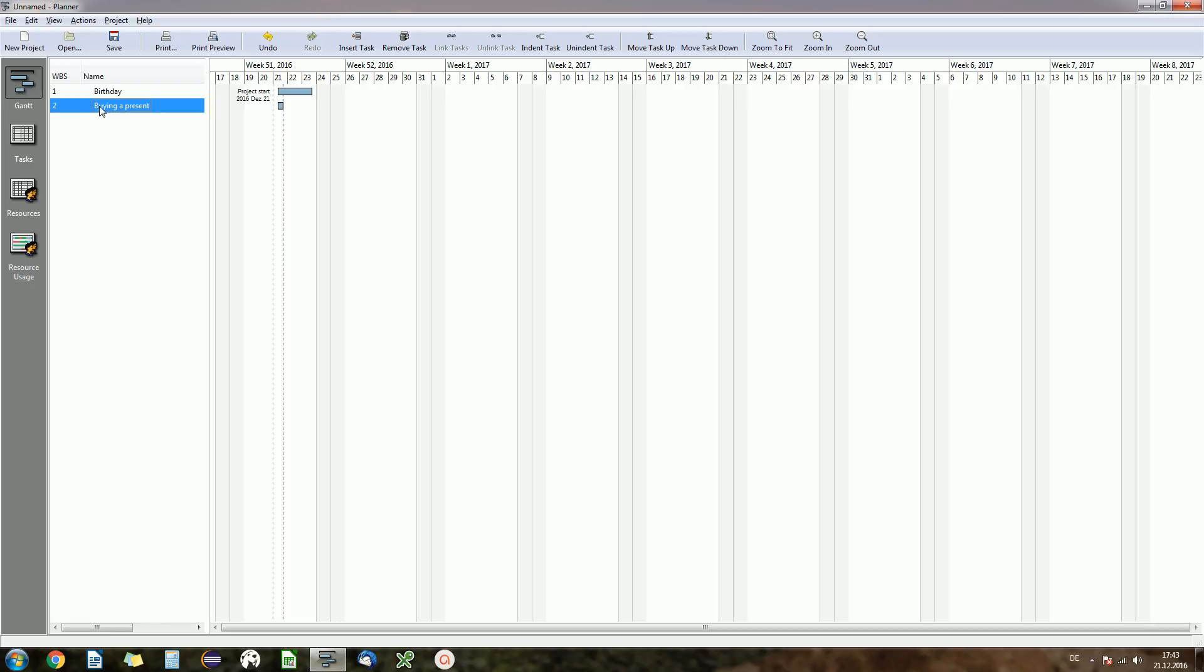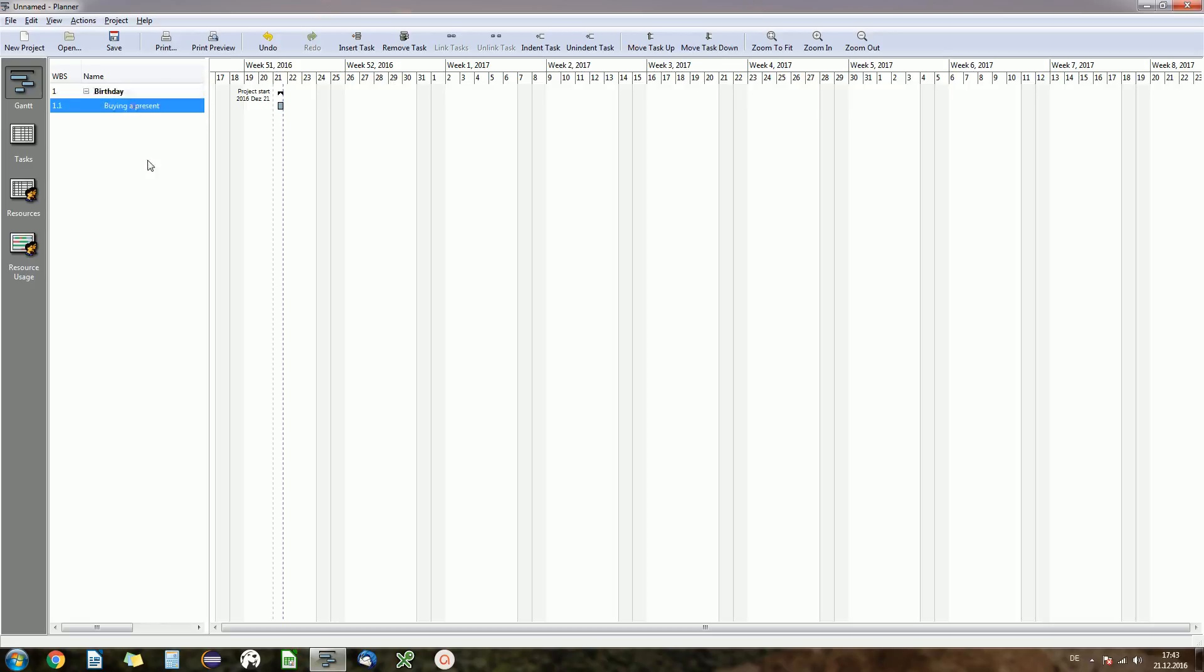So we select the task which we already have and click on indent task. And what happens now is our birthday task automatically became the parent task for our buying a present task. That's quite handy because now you see the black bar over our buying a present bar. The black bar is our birthday bar and birthday task.